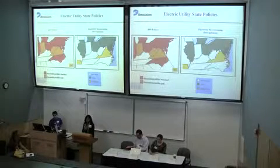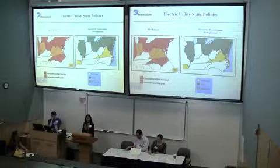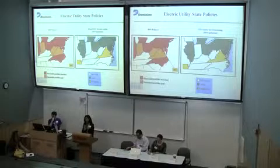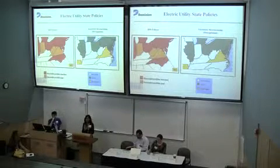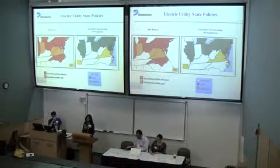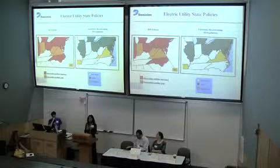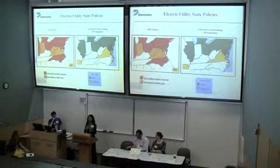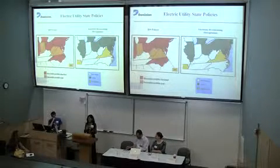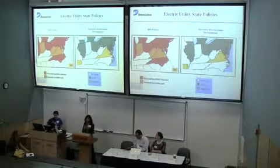Another factor that comes into play is, as I mentioned, being regulated versus unregulated. Typically, the regulated states tend to have a higher energy cost. So that means that when you're checking a project out against their current rates, it's easier to pass through because you already have a high rate, so you're coming in with a project that's higher cost. It's a lot easier for it to get through the commission or to justify putting in a project like that.